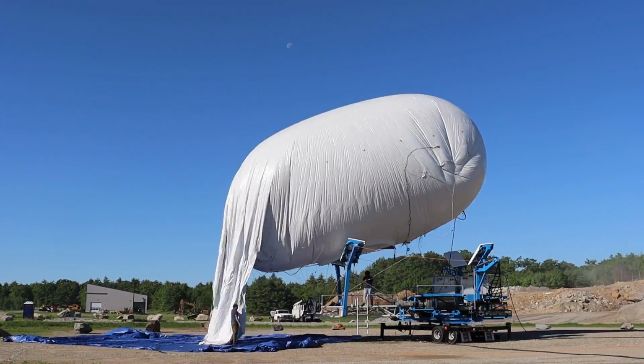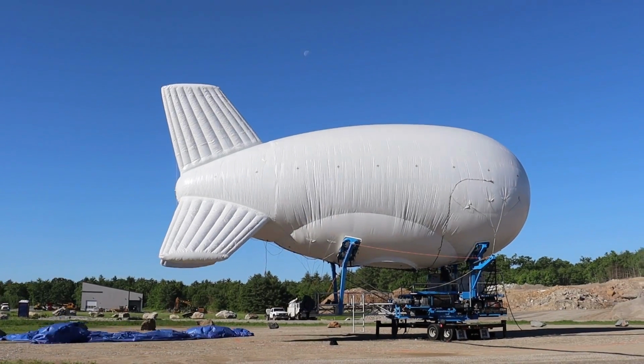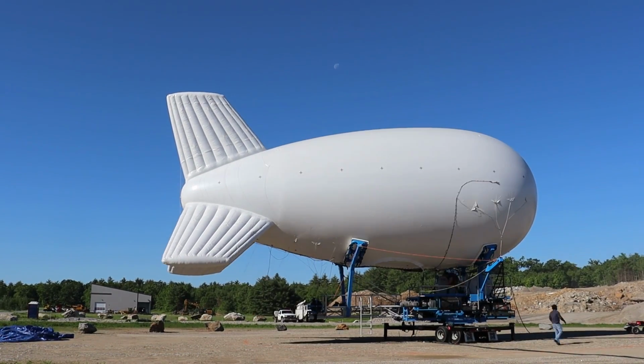We quote about 2 hours for the set trailer and 6 hours for the platform itself, so a total of 8 hours for complete integration.